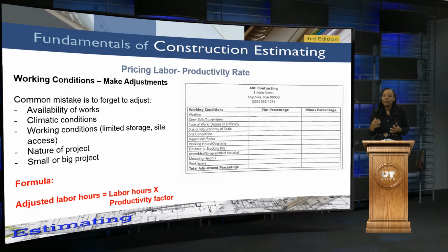So you really want to work through the logistics of how you would get equipment in and out, how trucks are going to get in and out of your job site. All of that is in effect. Time is money and is of the essence. So anytime you get in a situation where people are waiting and they can't even get on your job site, you're wasting money, okay?